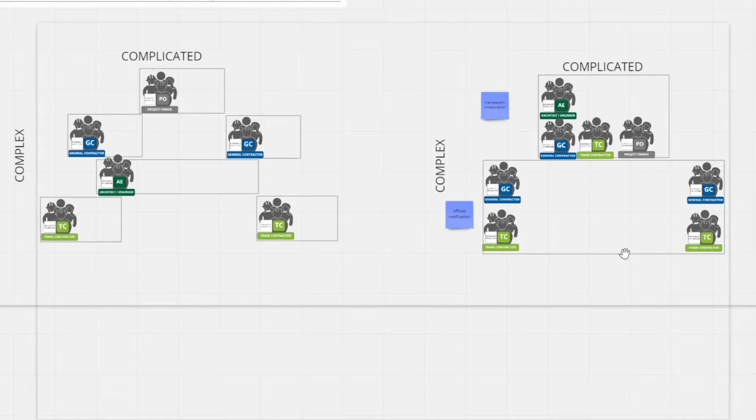I think it's like a more efficient way of doing a big room method. So a big room, you just get every single person who might need to make a decision on the project in a room and meet on a regular basis. That is incredibly inefficient, but it gets all the answers flushed out pretty well.